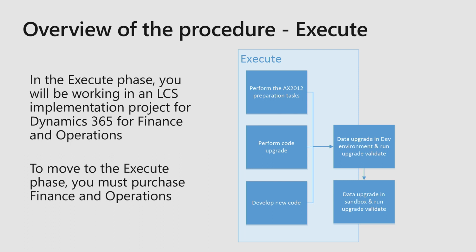And then as part of your analysis, you would have a project plan which you would have agreed with your steering committee, that there will be some customizations that you would do. When I say customizations, I mean in an extension fashion. So you would start working on them and develop your new code. And once you have all this created, then you would go through a test cycle, right? So we recommend you deploy this solution to your dev environment, get your AX2012 database prepped up, and go through the upgrade process in the dev environment.